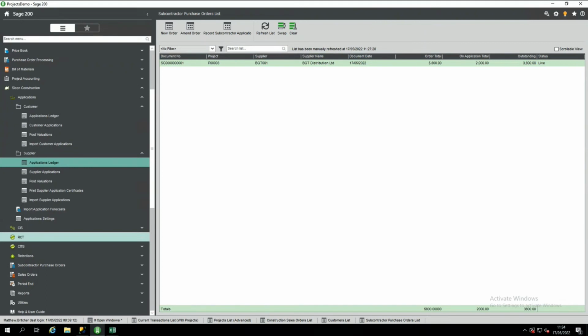So it's a guy on site saying, yes, this is what is being certified on that application, and then it coming back as approved, ready to be posted within the system. Or if he's reducing the value, he's forced to put a reason in there in a description, so that when we come back, whoever's in finance can print that certificate with the relevant valuation text in there to then send out. Yeah.